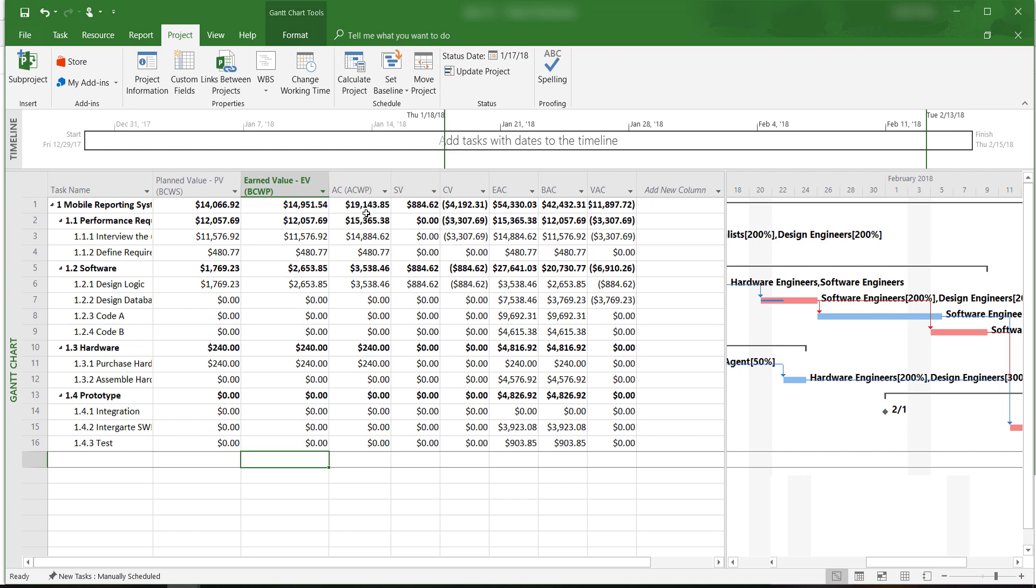Here, we see that we have actually spent a bit over $19,000. We have a positive schedule variance, which indicates that we are ahead of schedule and almost $900 worth of work has been completed up to this point that wasn't planned to be completed.